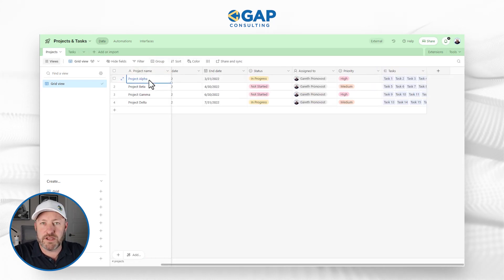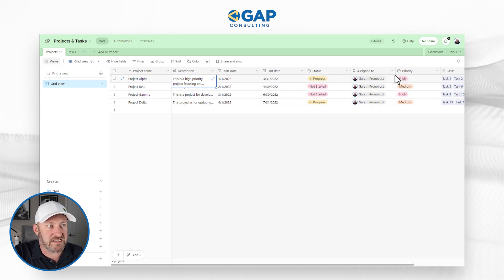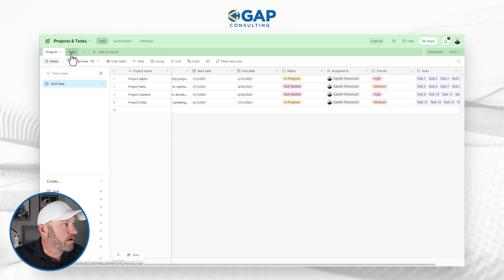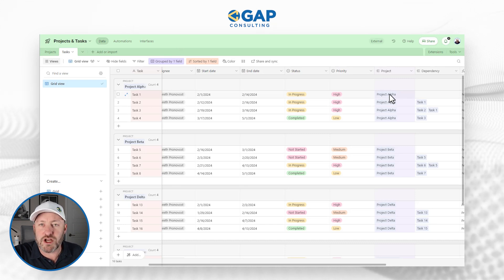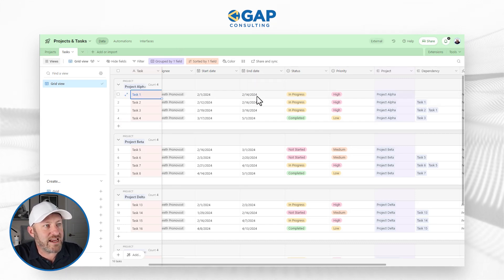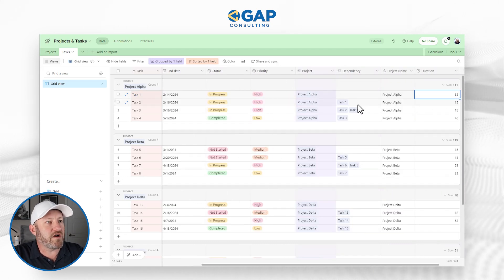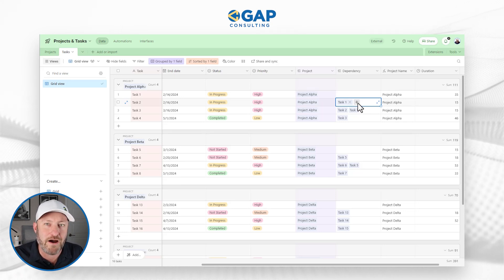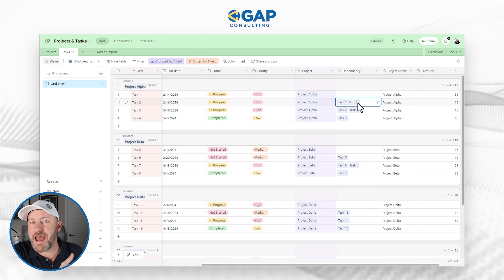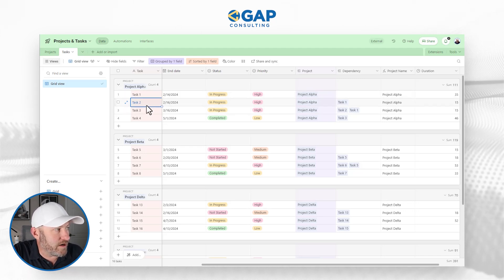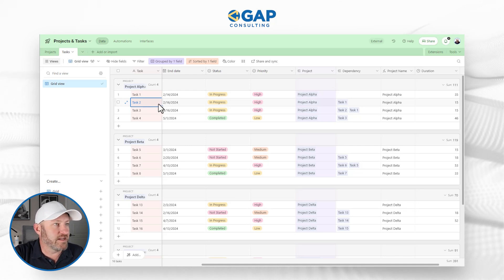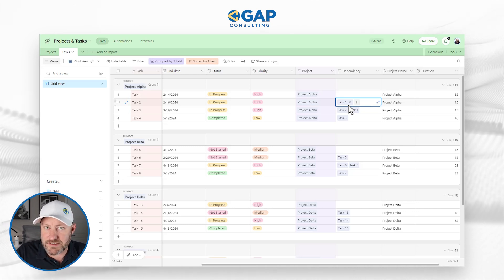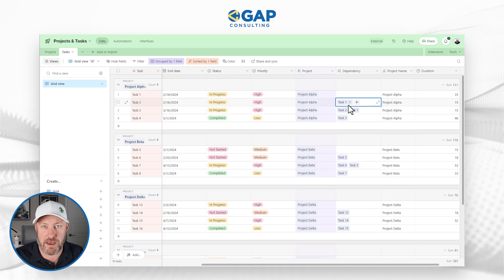I've got projects and tasks. Projects have a start date, end date, a status, they're assigned to somebody, and they're linking to tasks. On the tasks table, we have the projects they relate to, the task name, and start and end dates. I also want to highlight a dependency field here — this is going to be critical for the Gantt view. Before we can do task two, it relies on the completion of task one. This is a self-linking table where tasks link to tasks, used when we have an internal dependency within our table.